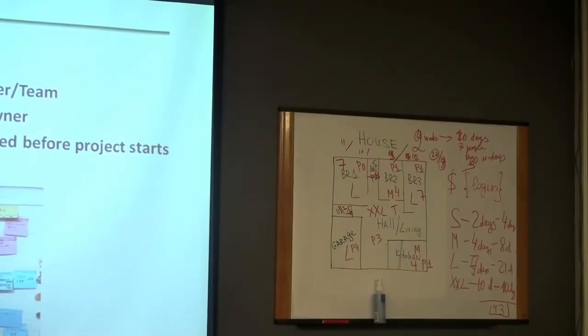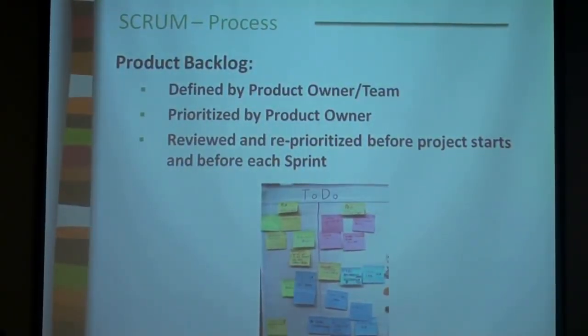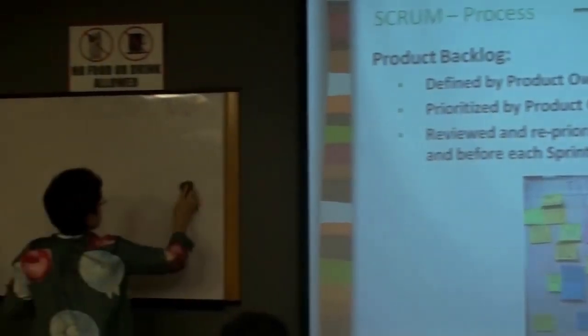Or what some people do in agile development, and this is actually a general rule for any project, not only software development. The rule of thumb is that unless you can break down your effort, which means features, down to smaller chunks, and the chunks that you have are more than 4 hours in duration, you cannot do precise estimates, which means you have to keep breaking your features down, right? Because when you have a large feature, you do not know how to quantify the effort. It applies to both development and QA.